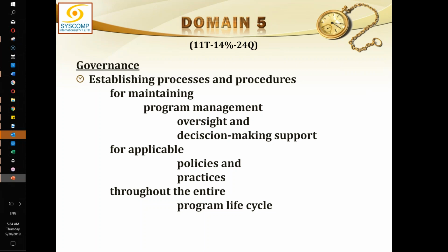If you are clear about the concept of governance, when we were doing project management, there was a project governance as well. And project governance was those set of guidelines based on which the project management plan was being created. So even before the project management plan was created, there was first a project governance structure established, which was in line with a higher order or higher level governance. If that project is a part of a program, then the project governance would be subordinate to the program governance, and program governance may be subordinate to the portfolio or organizational governance, and so on and so forth.